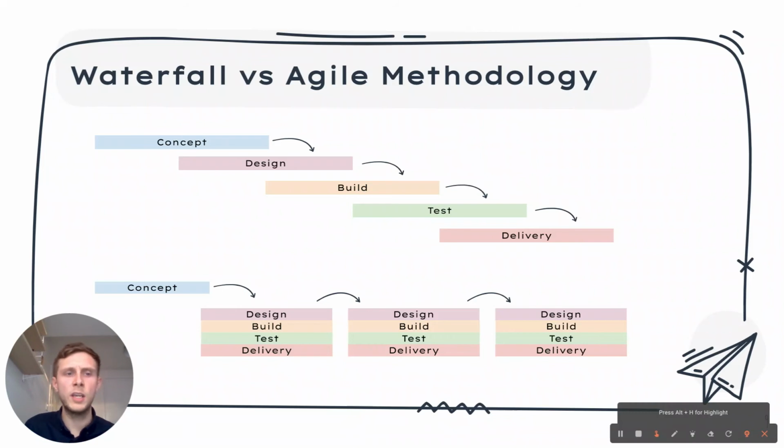What you can't really see in a graphical representation like this is the complexity or any regulations around the project. Again, if these were quite high, Agile may not be the best framework, and you might look to go with more of a waterfall style methodology. Again, ultimately, you'll get to the same position, you'll deliver your project, but it's about picking the right one, depending on the type of project and your customer expectations at the time.